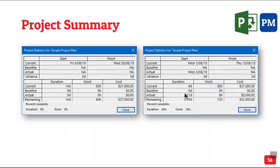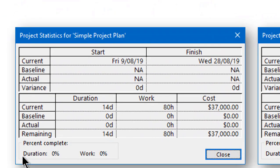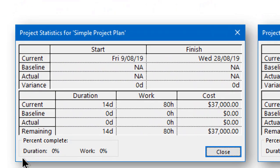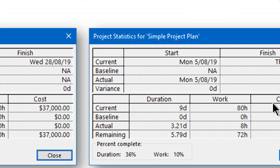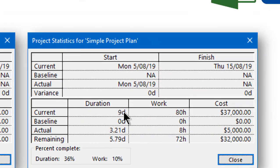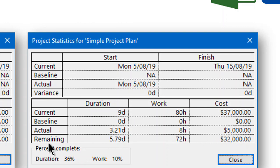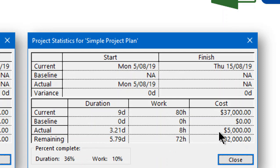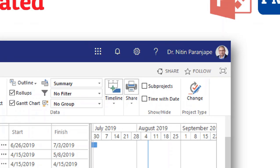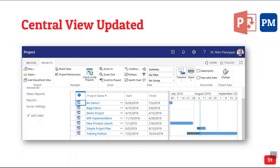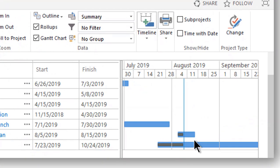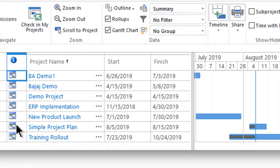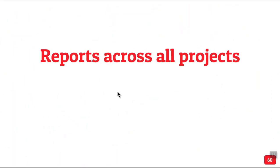Now notice, earlier we had this project statistics and we had some work here, 80 hours of work and 37,000. Now what has happened? The work has reduced because some work was finished faster. The cost has reduced and it's saying what is the remaining work and what is the actual work? What is the remaining cost and actual cost? Again, all this happened without writing a single formula. Now, if you go to the central view again, now we are as a PM, we are going here and on Project Online, even that is updated to show partial progress of this project.